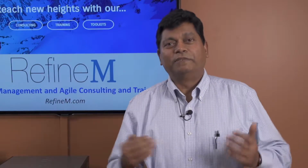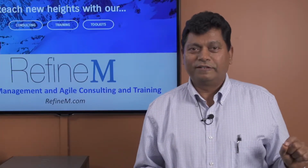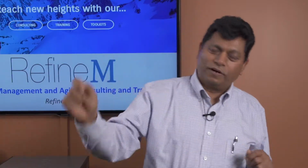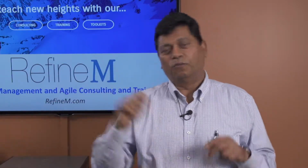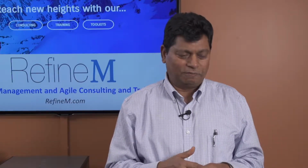Make sure that the communication plan has needs addressed for all the stakeholders. Every stakeholder needs to have a line in the communication plan that talks about what they need, when they need it, why they need it, and how a project manager is going to fulfill those needs. A very important thing, having a communication plan.